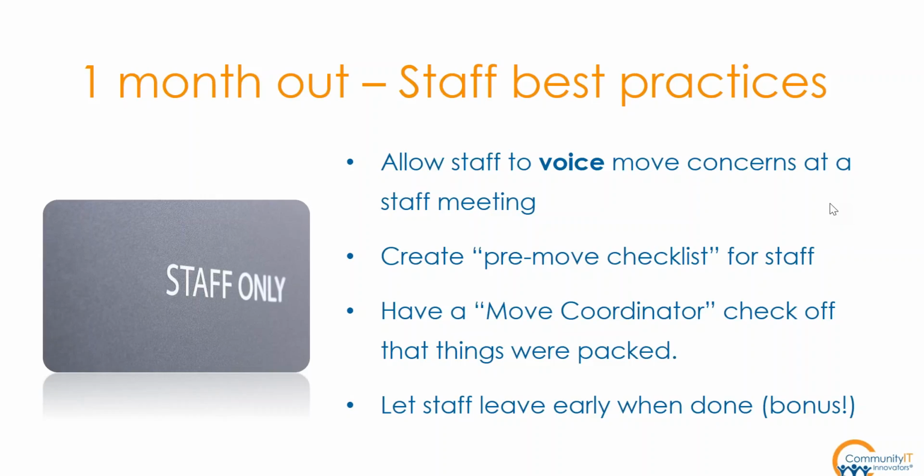Yeah, it's also a good time to show them the pre-move checklist that everyone has to do, and point out who the move coordinator is going to be if it's not you. Yep, sometimes that's just another staff person, but that's somebody who knows everything that needs to be done, i.e. just helping staff unplug or be prepared to unplug their computers, get all the peripherals, get their boxes ready, make sure they know the number of their office so they can get everything to the new place. Get the labels done. Yep.